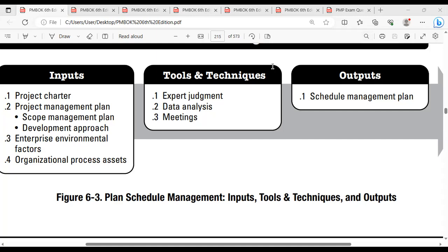Because you as a project manager, and the schedulers, the planning engineers, the planning department, want to know the granular level of information. You can know the nitty-gritty information about your schedule, but the senior management is not interested. Your sponsor is not interested to go through the depth. He needs summary information whether we are on schedule, behind schedule, or ahead of schedule. How well is the schedule performing? Can you show the schedule performance index, whether it's above 1, below 1, or exactly equal to 1? So which will be the best format for you to exhibit?